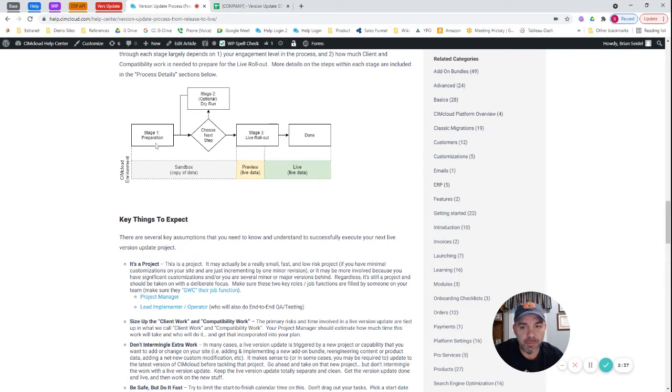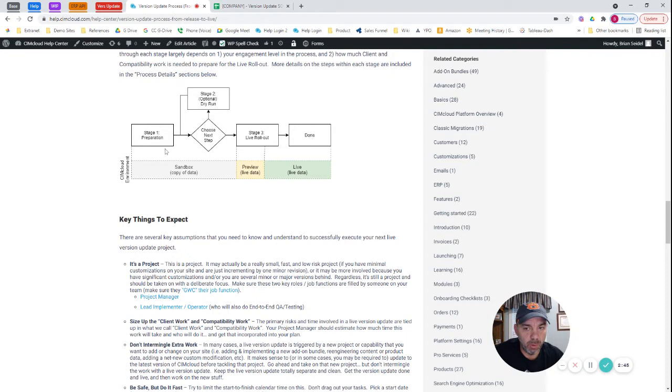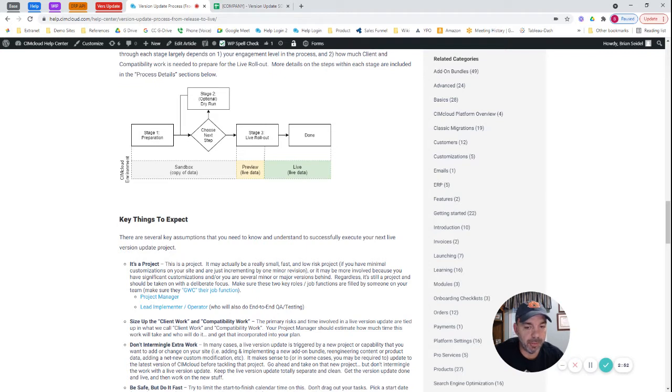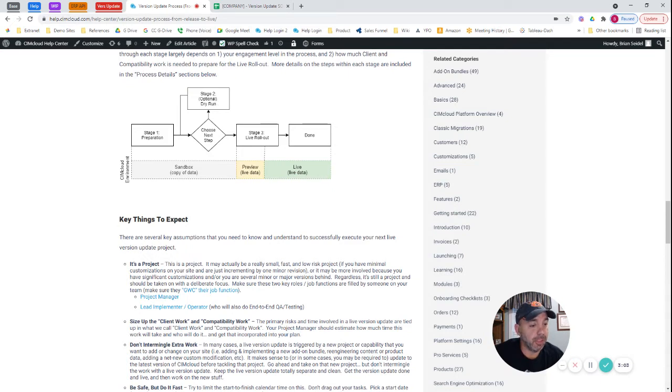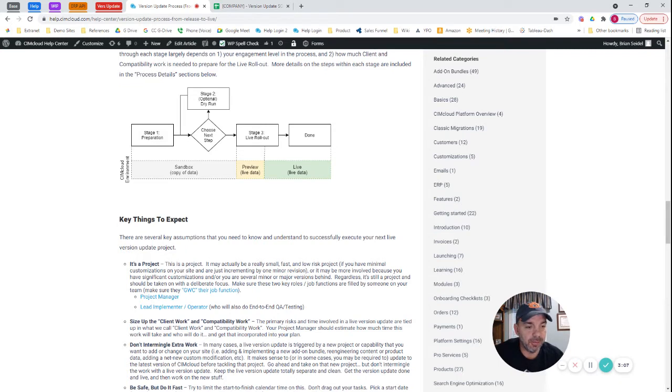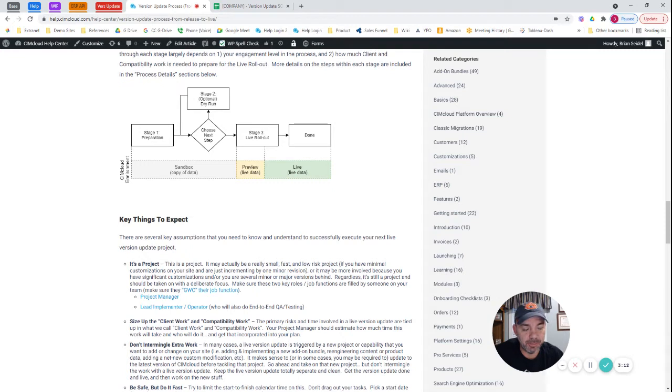So the general concept is stage one, I'm doing preparation on a sandbox and testing everything. I'm going through a battery of tests after the version update, working through, punch-listing any of the issues, doing the client, identifying, and then doing the client and compatibility work, tracking all that in the go-live checklist because it's going to be used here. And then if you feel like the risks are too high or you want to further de-risk it, you can choose to do stage two, which is doing another dry run. It's cutting another sandbox, essentially, and walking through the entire process again and validating your go-live checklist to make sure everything works and all your tests check out.